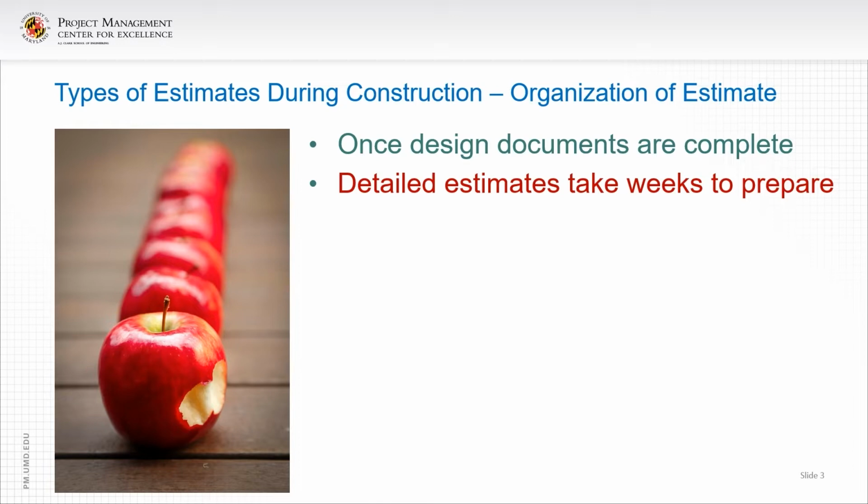Quotes from material suppliers, also called vendors, are used where possible to get precise material prices. When quotes cannot be obtained, contractors use company records and published cost data. Current wage rates and perceived worker productivity are figured into these costs.